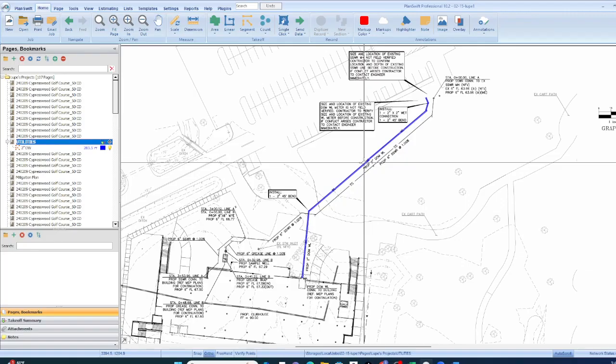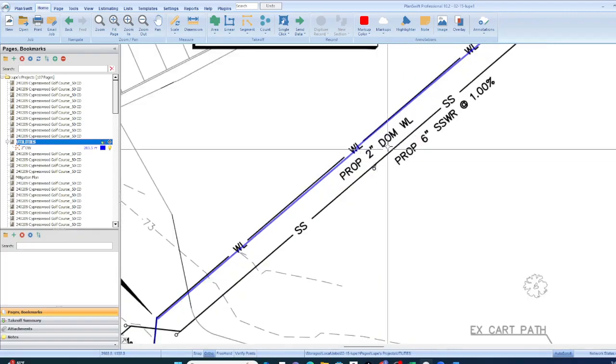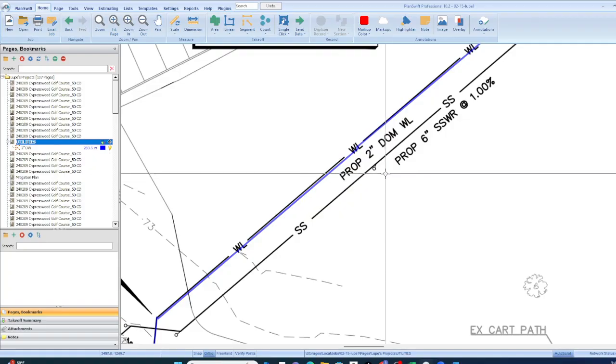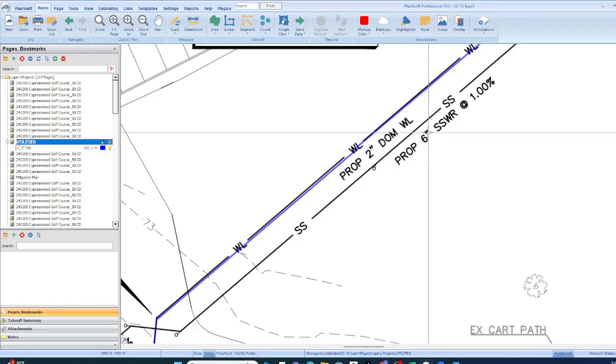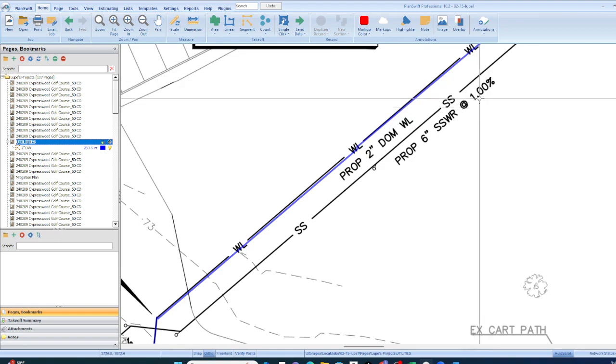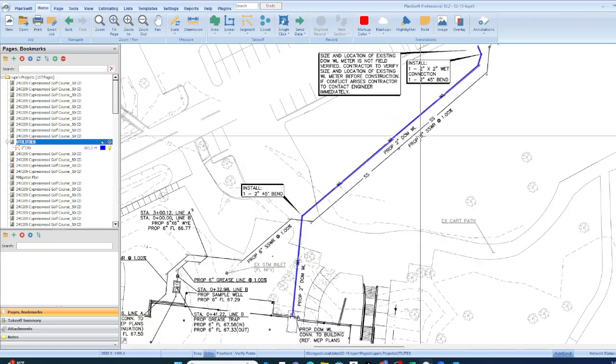So just very quickly, we measured this DOM, that's the domestic water line, and we had about 264 feet of that. And then we also have a 6-inch sewer line. This tells you the slope. It's to slope 1% of slope as it moves on per foot.